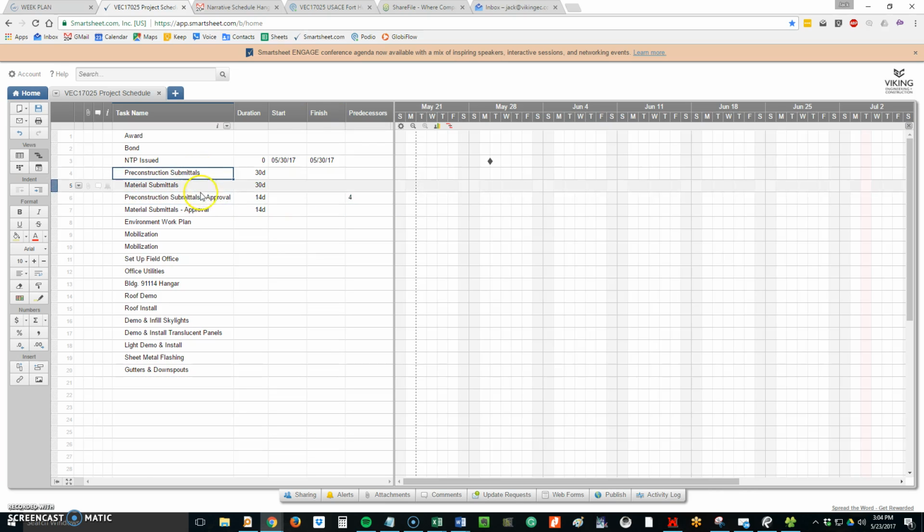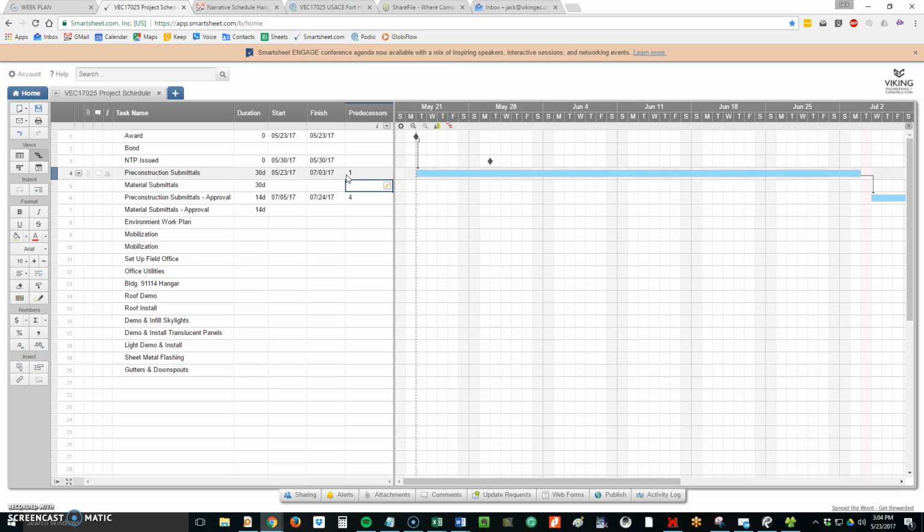Okay. So let's assume I'm putting some fake dates in here, right? Let's assume that 5/23/17 was the award, which is today, which is not the case, but let's say that I'm going to start the pre-construction submittals right after the award. All I have to do is put in predecessor 1. I'm going to do the bond, the same thing, predecessor 1. Notice to proceed issued.